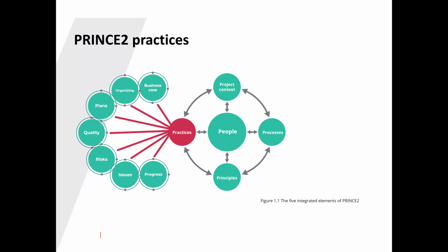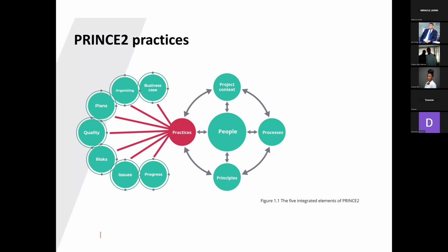For some of us that want to write PMP, you will see that in PMP, business case is only mentioned once, because PMP believes that it is not the responsibility of a project manager to develop a business case. The only time you will hear it is as an input to the project charter. They believe the input to the project charter is just a business case saying the project is viable, then let's write a project charter and give it to the project manager. Project charter is another word for project mandate. PRINCE2 spoke about project mandate, PMP spoke about project charter. Same thing, but different naming, okay?